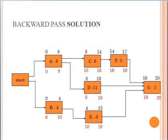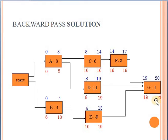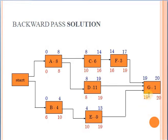Let's continue this exercise for which we have done the forward pass calculations. My starting point here is 20 because I have no constraints — the completion time of the project was 20. So this is my starting point, week 20, and I will go backward. This means that 20 is the latest finish of activity G. The latest start is the latest finish minus duration: 20 minus 1 equals 19. So 19 is the latest start of activity G.